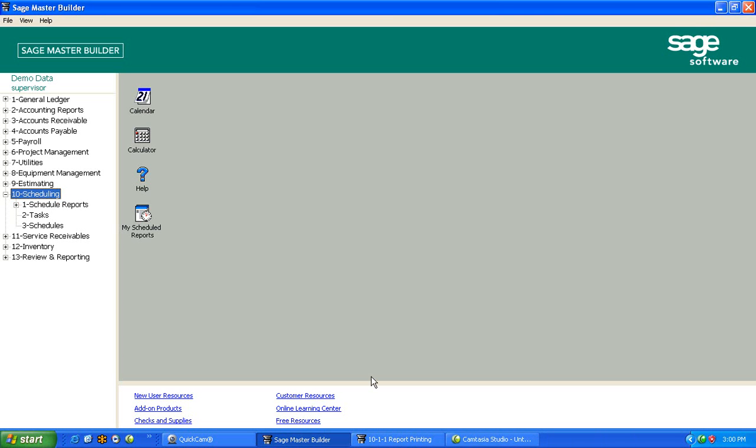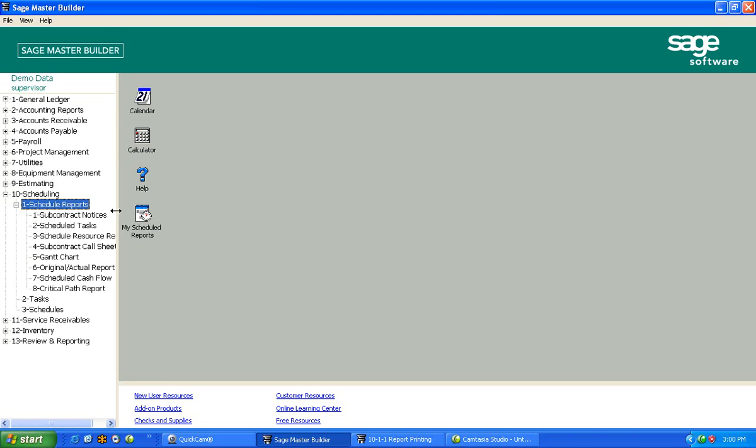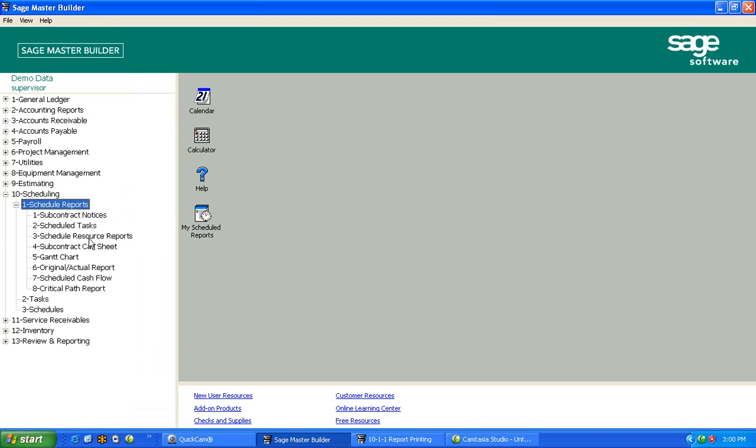Again, I didn't want to spend a lot of time on scheduling because everybody does it a little bit differently, but right there within Master Builder, part of the package is scheduling, which allows you to schedule the projects and apply your resources. There are other reports, I'm not going to print them, but included are as scheduled tasks, a list of our resources that we need, a subcontract call sheet, which we just looked at, the actual Gantt chart, and a scheduled cash flow. If you used estimating in Master Builder and use the scheduling within Master Builder, it's going to take the tasks that you identified and the cash flow on each of those jobs and forecast out cash flow by day, week, or month based on your estimate and your schedule within Master Builder.